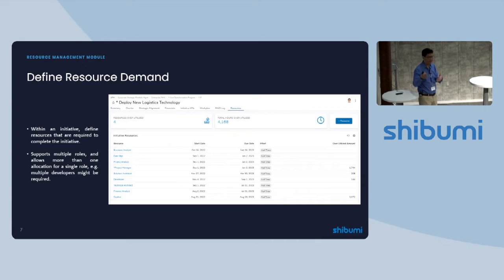We certainly have customers who have done a variation on that, where at planning time they are planning on a particular person to be allocated to the project. We found more commonly that you don't know who's going to be available or who's going to be able to fulfill that. So we more often find people doing the planning side of it at the pool level, and then the actual association to an individual person would be done later on in the process, when they're actually trying to schedule out people's calendars and such.